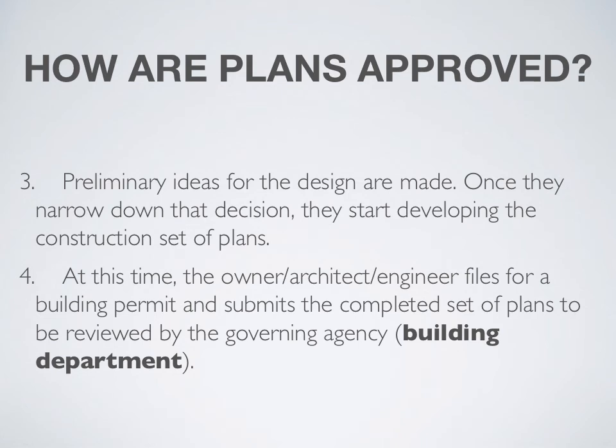Preliminary ideas for the design are made. Once they are narrowed down to that decision, they start developing the construction set of plans. At this time, the owner, architect, or engineer files for a building permit and submits the completed set of plans to be reviewed by the governing agency, also known as the building department.